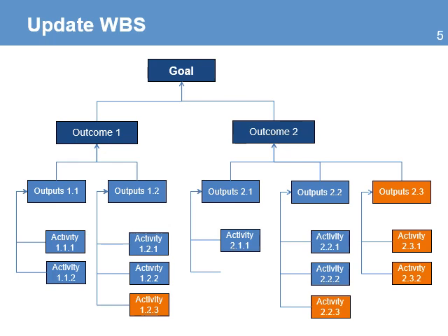You can also add a note to the document to reflect changes made in the new version of the WBS. For example, that activity 2.1.2 has been removed and a new output 2.3 and 4 new activities have been added. All the scope management documents will also need to reflect the new changes. These include the scope of work and the scope section of the project charter.